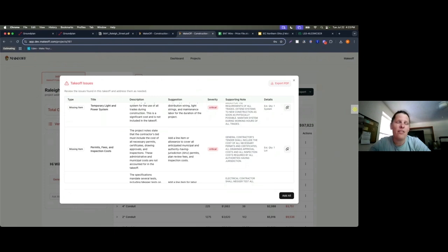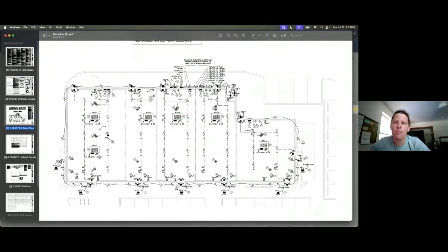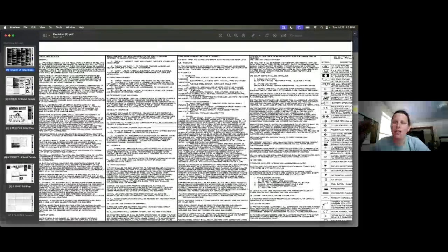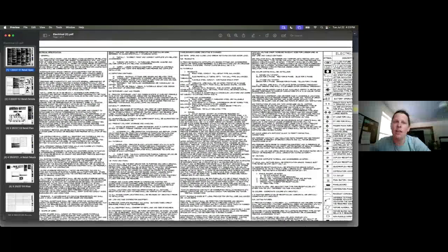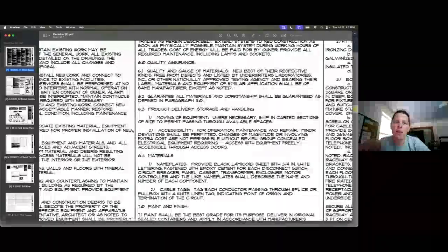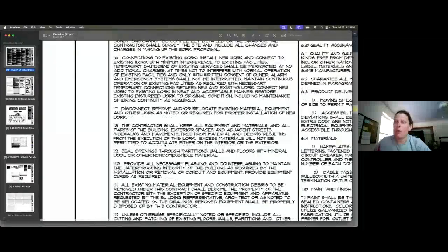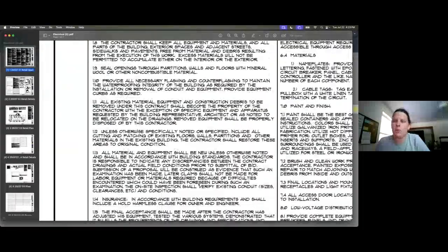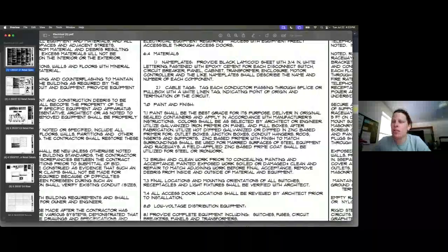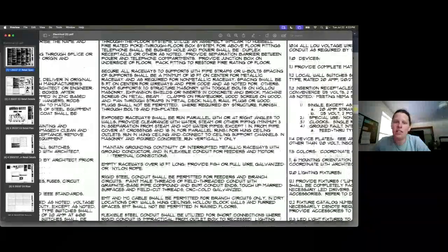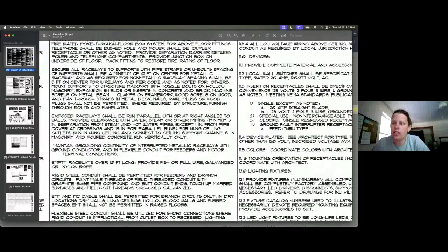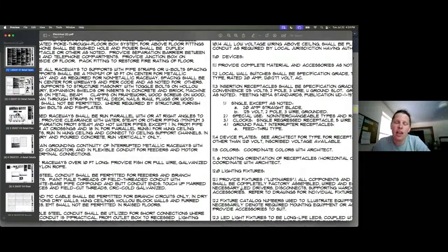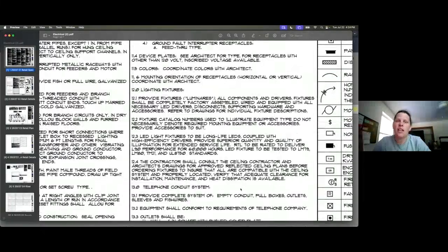And then if it's interesting but not impactful, I'll flag those in one color. And in the other color, if it's impactful from a price or performance perspective, then I flag those as things we're definitely going to need to hit. Those I usually highlight in red. A lot of this has been hand jamming, but that's what I'll look at.